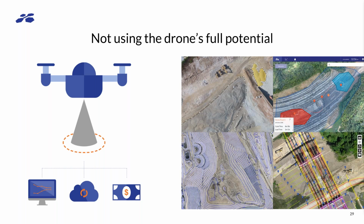With our solution, again, you're looking at contour maps, as-built versus as-planned, change detection technology, volumetric analysis, getting a real handle on what your cost per unit is, whether that's cubic yard of earth moved or acre cleared. What that's going to do is inform much more educated bidding, empowering much more profitable bidding moving forward. It also gives you a database and an archive.